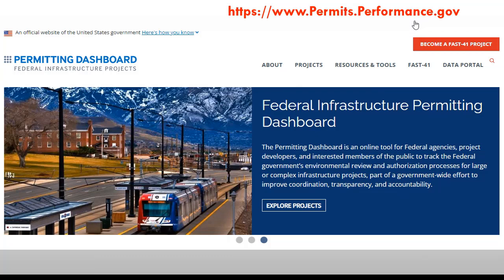Now, if we're the lead federal agency and we have an environmental impact statement, then there are different requirements under NEPA for going through the Federal Register and that kind of public involvement. But those situations for us are very few and far between. I think we've done 2 over the last maybe 5 or 10 years or something like that. We're generally not the lead agency for those big giant projects that require an EIS.